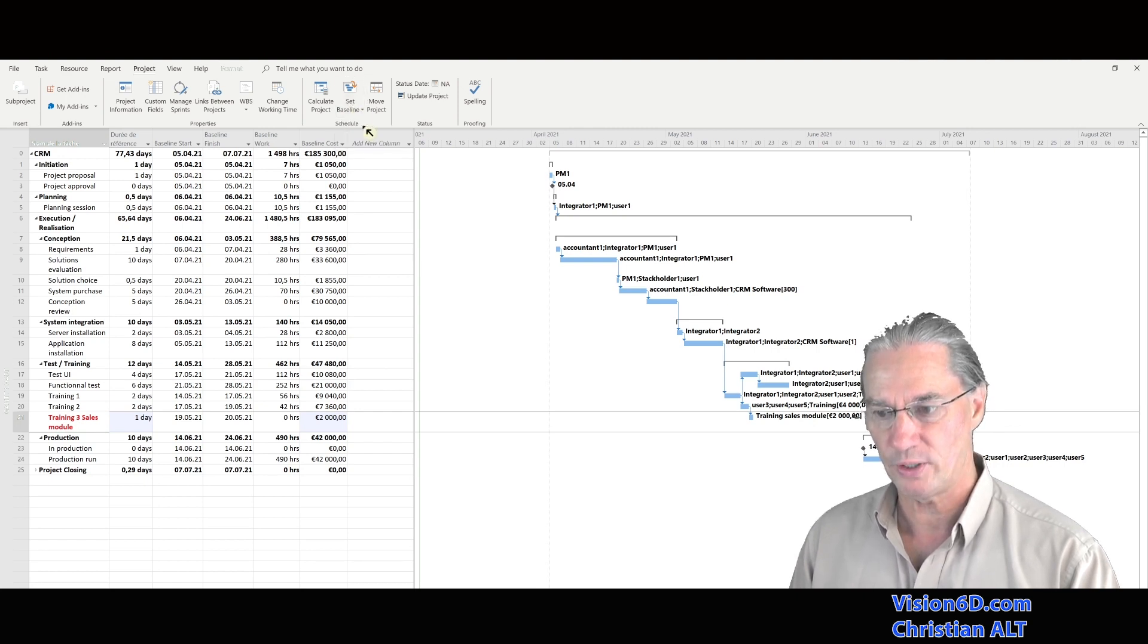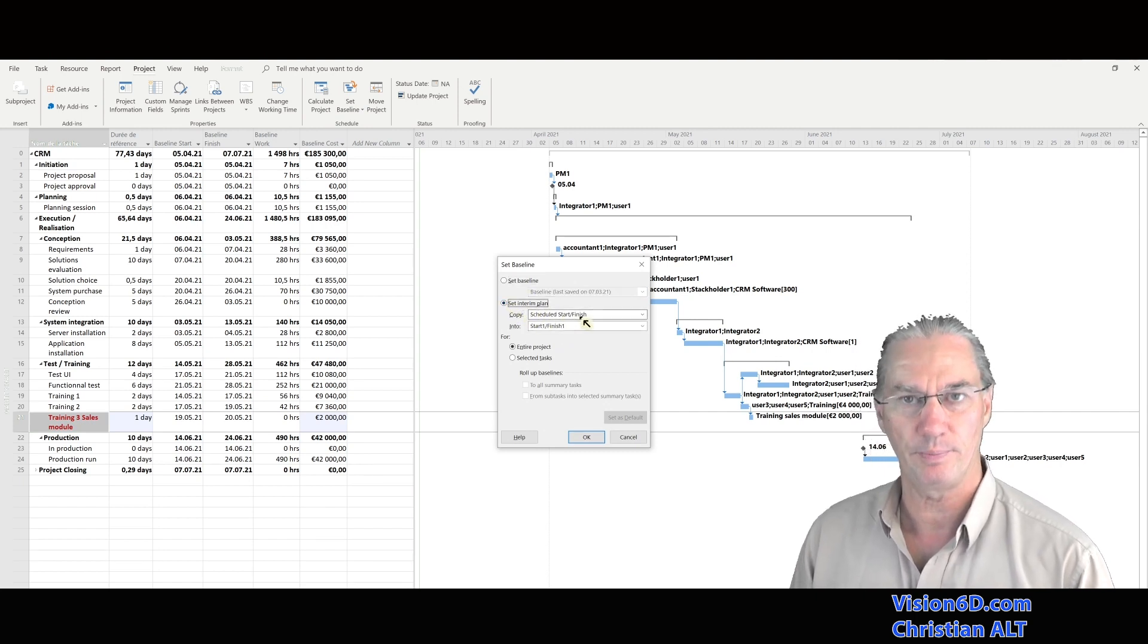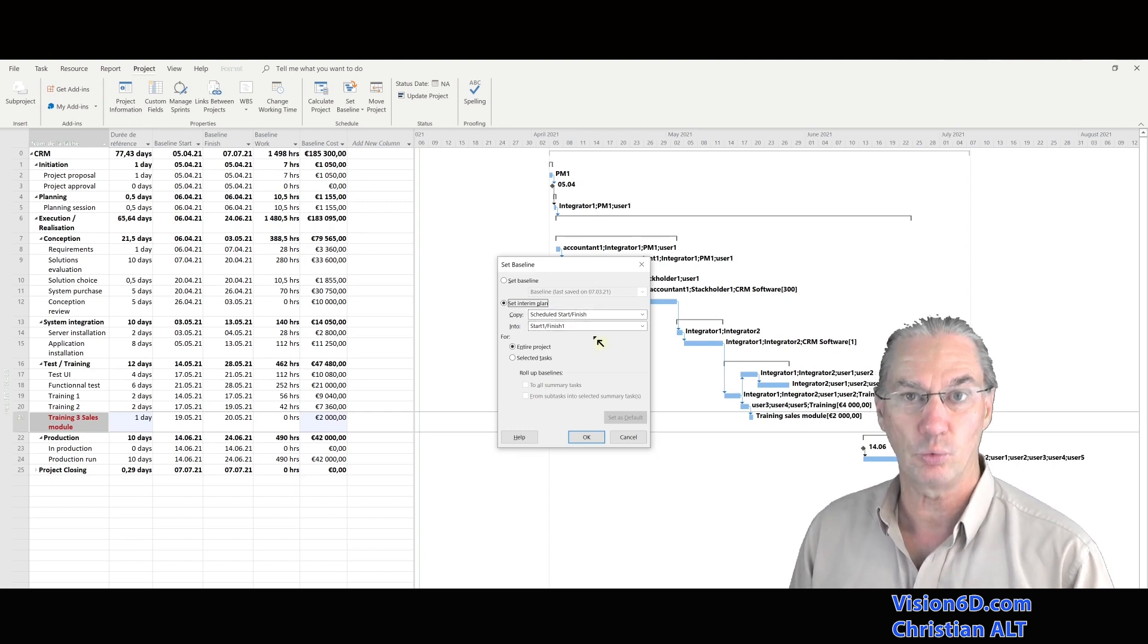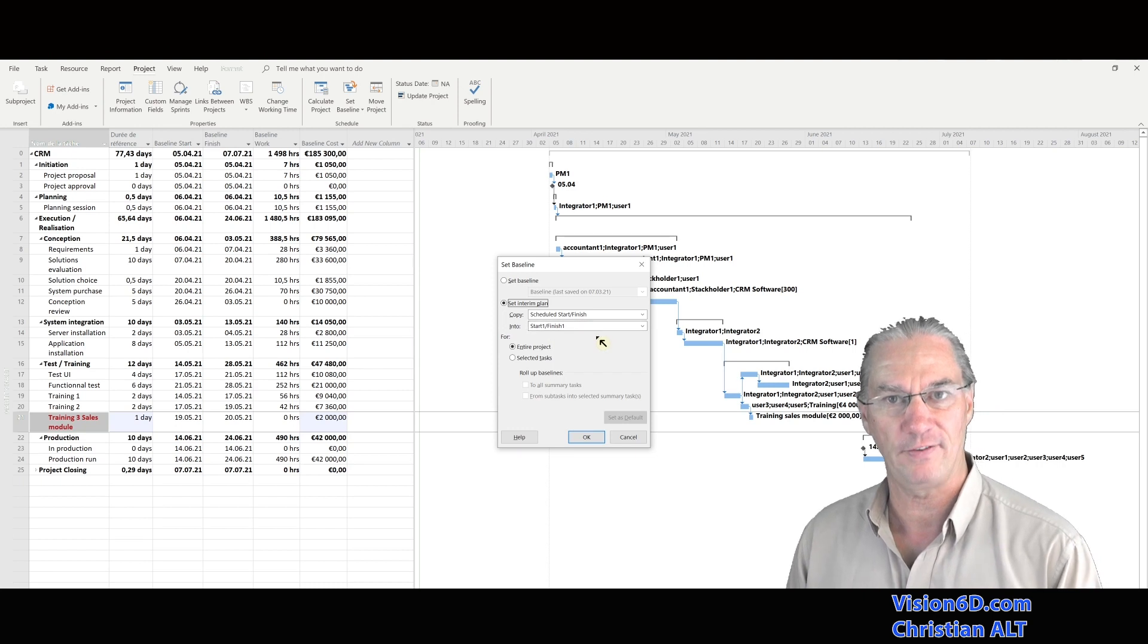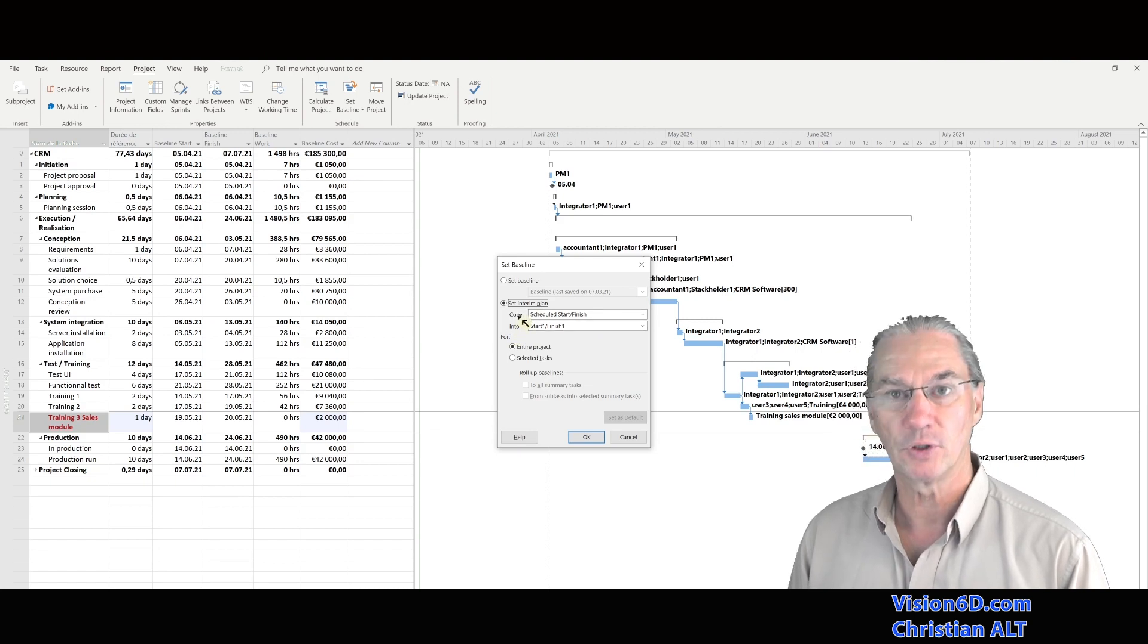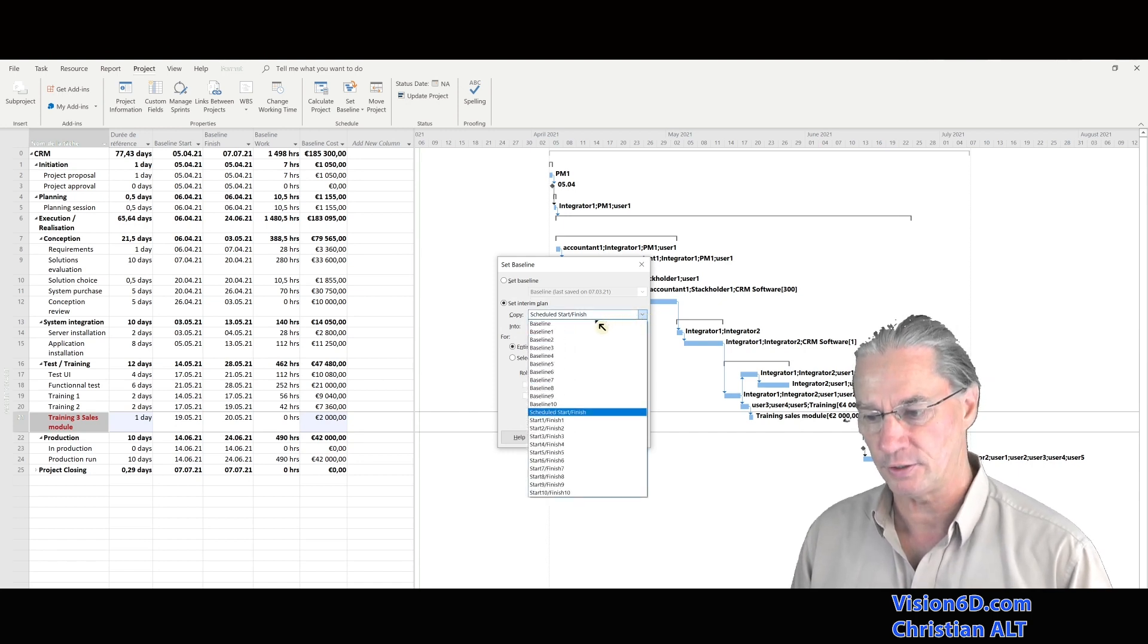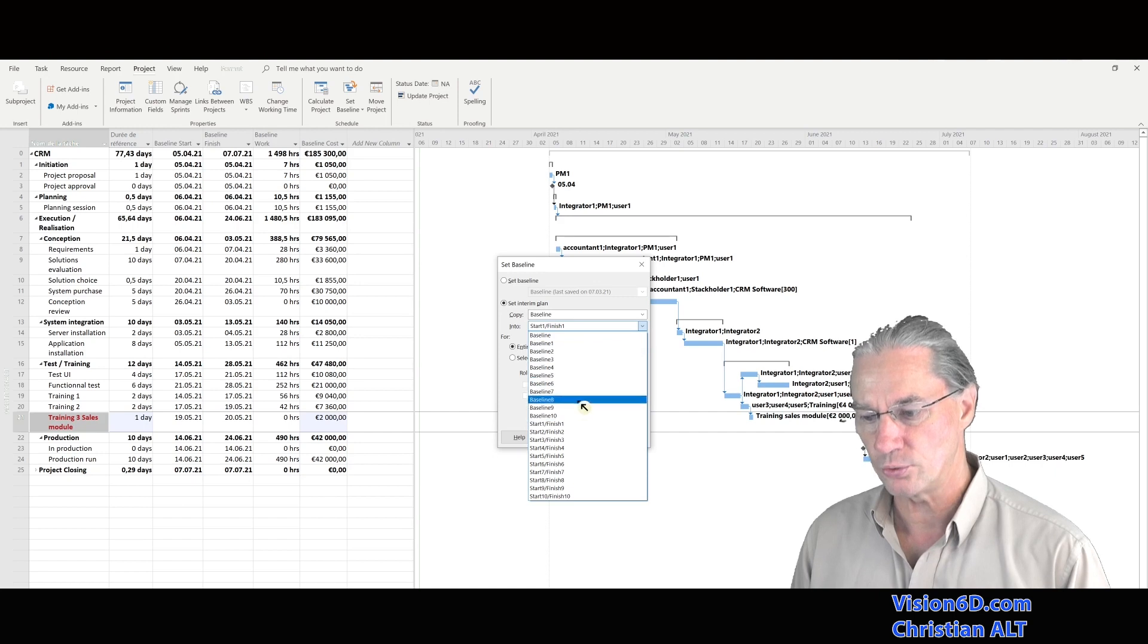For this, we go again into set baseline. And we have what is called here, set interim plans. An interim plan is like a lightweight version of your planning. You could have simply start and finish date instead of having all the details. So I will keep this. And you see here, the copy possibility. So we have the possibility to copy fields to other fields. And here, we also have the possibility to copy the baseline into, and I will choose another baseline.